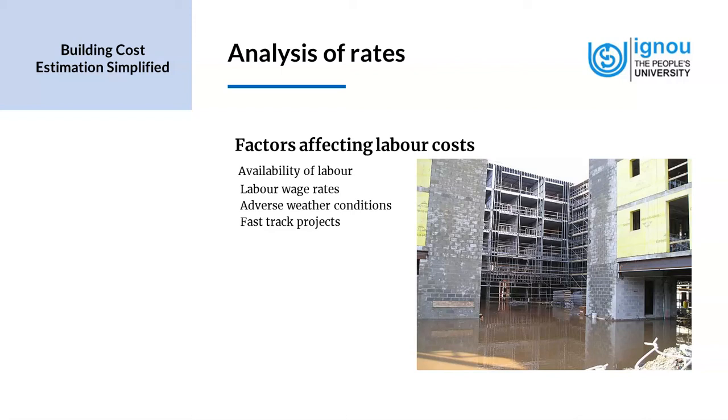However, sometimes just increasing the labor may not be the solution, as this could also lead to congestion. So as an alternate, we might have to extend the working hours from 8 hours per day to 10 hours per day. And when we look at some of the studies that have been made, we see that productivity drops with increasing working hours over a week.